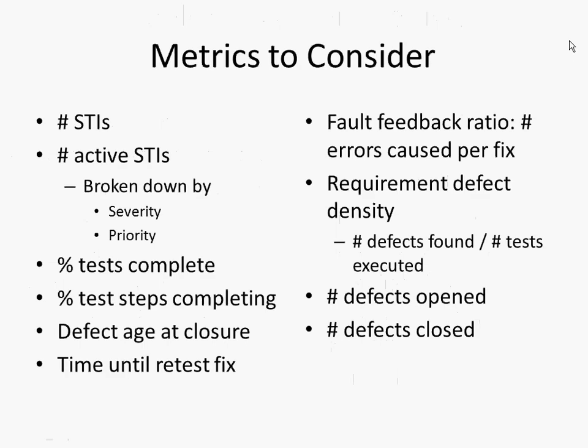One of the other uses of test reports is they can inform decision making — they can inform the project manager's, dev lead's, or test lead's choices. If the test lead is monitoring the sanitized defects in the system and starts to see a lot of them having to do with a particular piece of UI, they might select that as something to test manually, go in and do some more testing, maybe write some more scripts. Look at your test matrix: how many scripts do we have targeting this area of the UI? Maybe we've got to write some more tests.